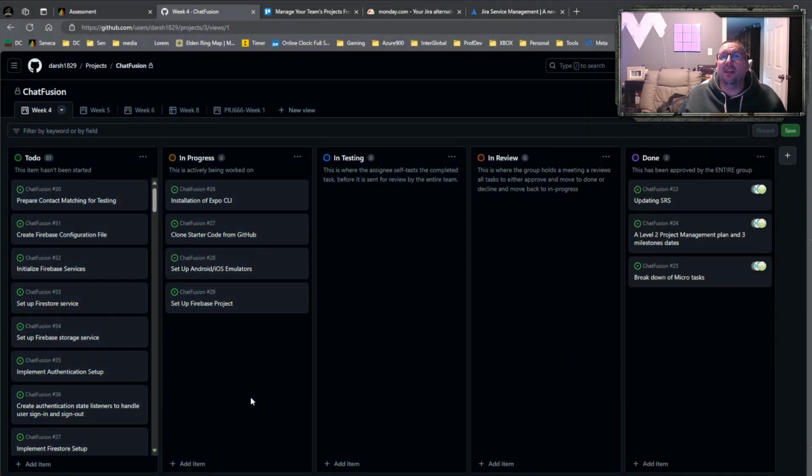We then can either leave it assigned to the current user, or if that now involves somebody else because it was an integration issue, now they need to talk and work together, then you can change the assignees at that point. Okay? Then it goes through the progress again. You do the coding, you test, do the coding, test, do the coding, test. Once you're satisfied, move it to in review, and in the next meeting, it's going to come up again, and you're going to discuss it until finally it gets approved by everybody and it moves to done. Okay?